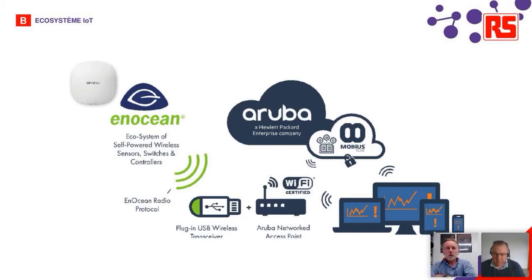But when you consider that when sensors require cabling, power, and additional network connectivity, the cost of those things is multiples of the cost of the actual sensor. We have situations where the sensor and the connector itself is sub 100 euros, and the cost of deployment is greater than 300 to 400 euros by the time you provide power and data and connectivity. Then that's why a lot of the projects and POCs and pilots don't go ahead, because the cost of the infrastructure is so prohibitive.